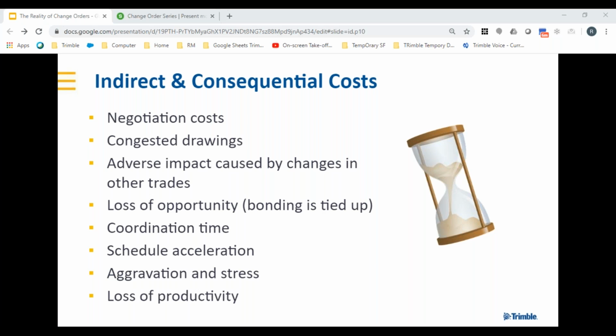I would take a look at the number of projects that I was managing. If that was the only project, fine. But normally I was managing 2 or 3 projects under my wing. The total value might be $2.5 million. The point I was trying to make to the client is every time you call me in here to do a negotiation, there's going to be a hiccup or a loss of production, because somebody on one of my other projects is probably trying to reach me, trying to get a decision to make an execution in a timely manner. So it actually came to face-to-face negotiations would be the approach I did on the very first change orders.